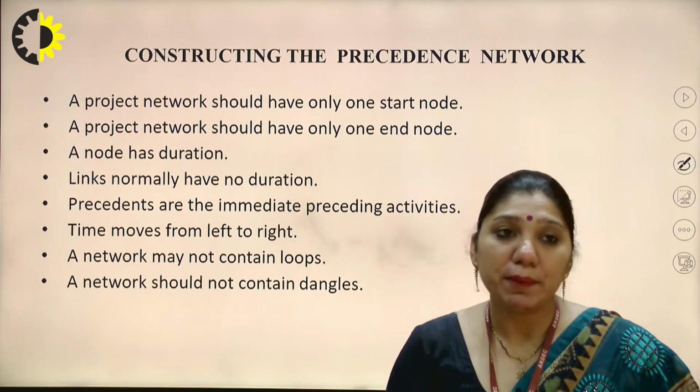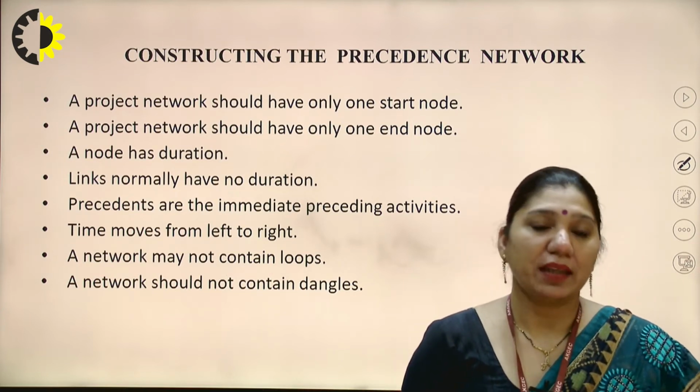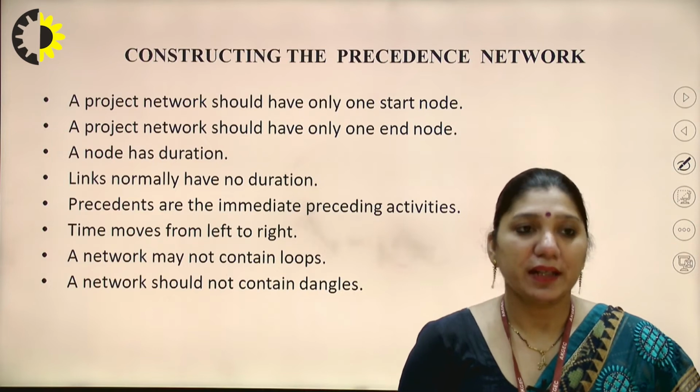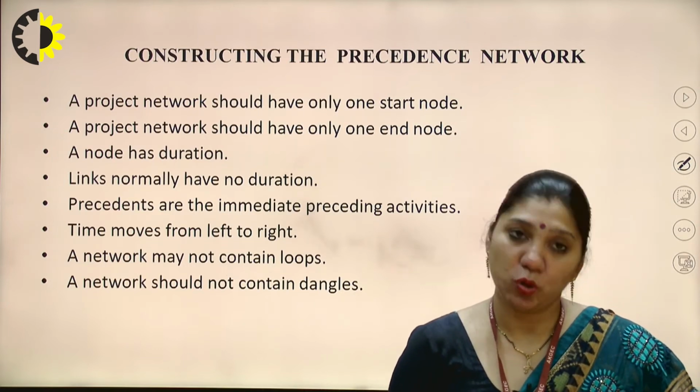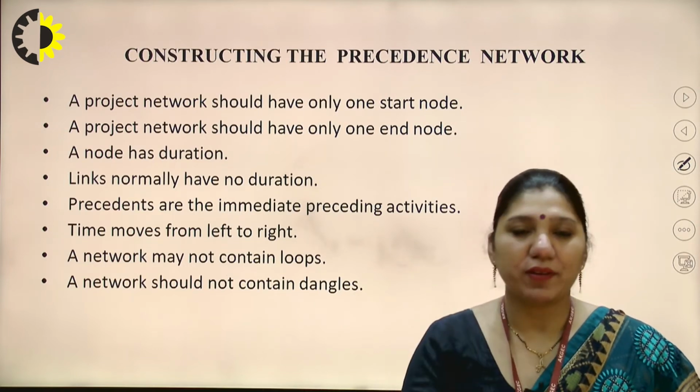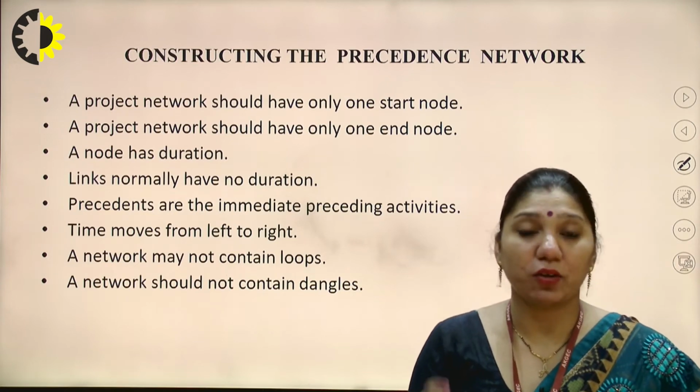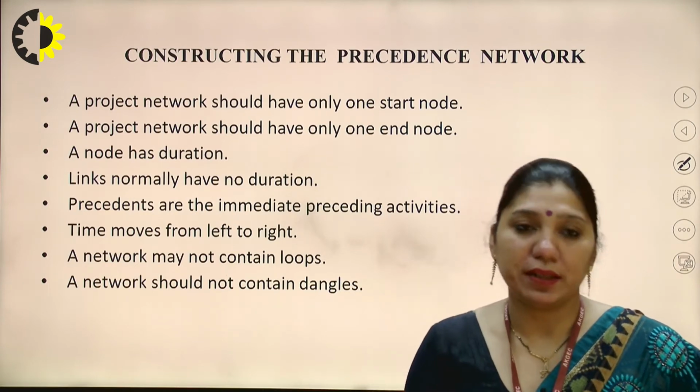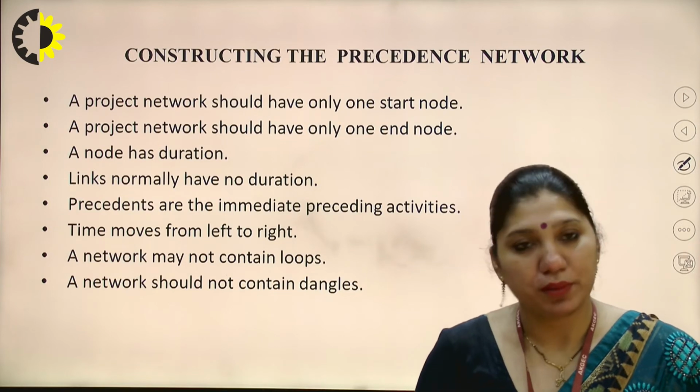Precedents are the immediately preceding activities. And time moves from left to right. Our network may not contain loops. Of course, a loop is a circular loop. It should not form like that, because parallel execution is allowed, but loop formation will create a problem in the projects.